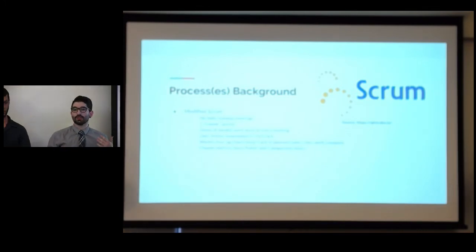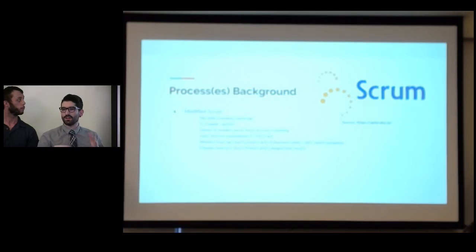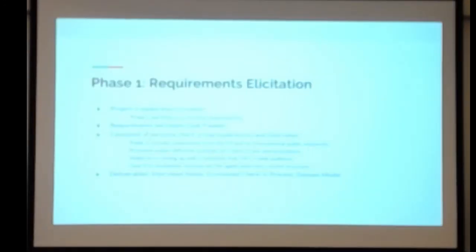We do demos every week. We do every 2 weeks, but we like to do it every week just because we like that constant feedback mechanism that these demos give us. And on top of that, we track our user stories in UTrack, and this also has our backlog and our sprints and stuff. And we do weekly 4-up charts, and on top of that, we have our metrics, our story points, and categorized hours.